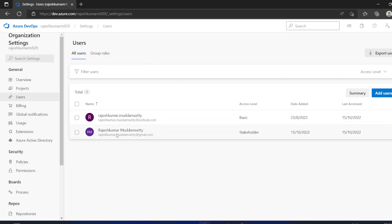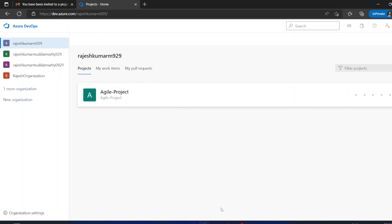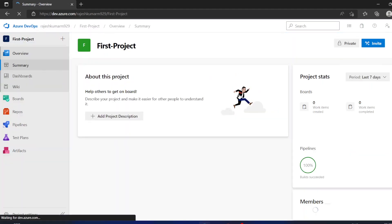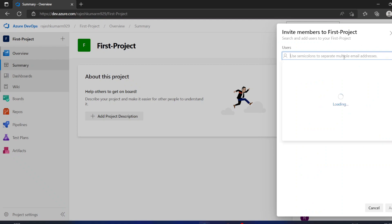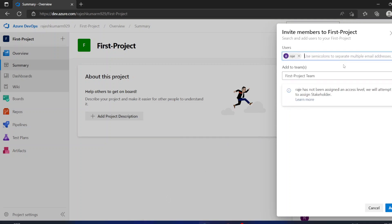Once a user has been added to one project, they become part of the organization. This user is currently part of only the Agile project. If you want to add them to another project, go to that project and use Invite. When you type the name, the user appears automatically — because adding a user to one project makes them a member of the organization, and they can then be added to any other project.